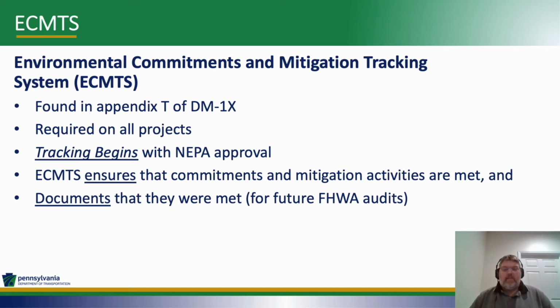The ECMTS really has two functions: to ensure that the commitments and mitigation activities happen during construction, and then to document that they were met. So when Federal Highways asks us about those activities in the future, we can show that they were done.